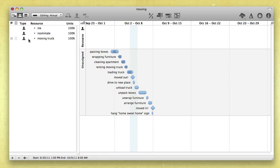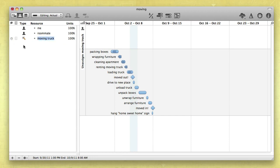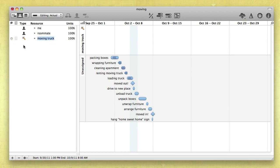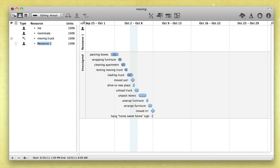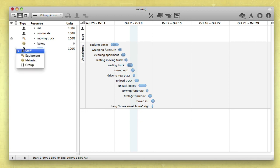By default, added resources are considered a staff member. Just click its icon to change the resource type. Equipment is a reusable asset, like a computer, a forklift, or a conference room. While materials represent consumable supplies, like paper, paint, or nails.